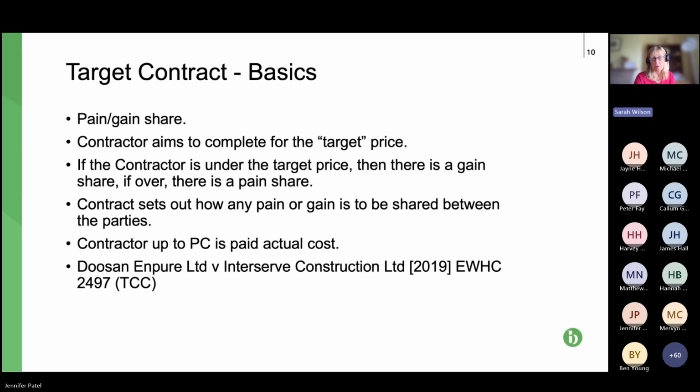The matter went to court, and the court said no, it's pretty clear under the contract, and it's pretty clear under NEC C and D also, that the first allocation of the pain gain share is at practical completion. Now, when you're in pain, that's problematic because the contractor, in a contract scenario, typically will have been paid money which everybody knows will ultimately have to be paid back, in part or all, to the paying party.